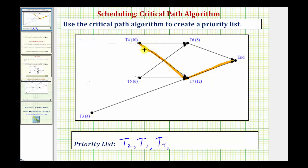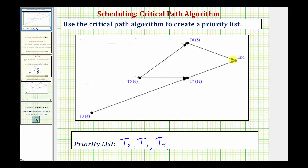Now we eliminate task four from the digraph and repeat. As the number of paths decreases, this process gets easier. Starting at task five, we could go from task five to task seven to the end — that would take six plus 12, or 18 hours, which will be our critical path. From task three to task seven to the end would only be 16 hours, and from task five to task six to the end is only 14 hours. So this is our critical path, and therefore task five is next in the priority list.